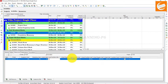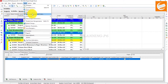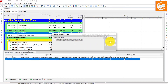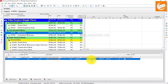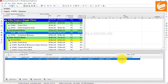Set the Actual Overtime Units to 10. Now go to Tools and Recalculate the Assignment Cost, then schedule it again. Now you can see the Overtime Cost has appeared, the Actual Regular Cost is shown, the Actual Cost is shown, the Overtime Factor is 1.5, and overtime is allowed for this resource.